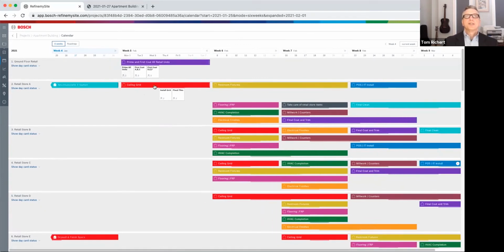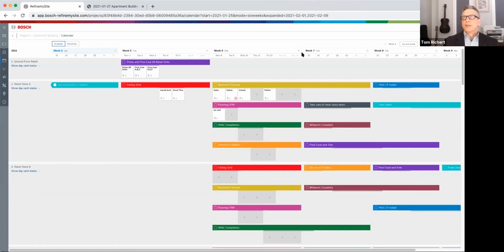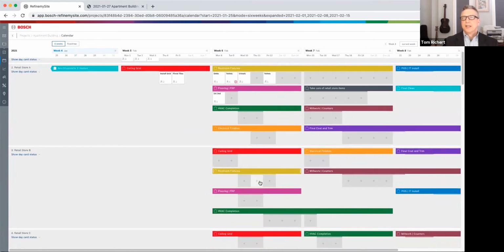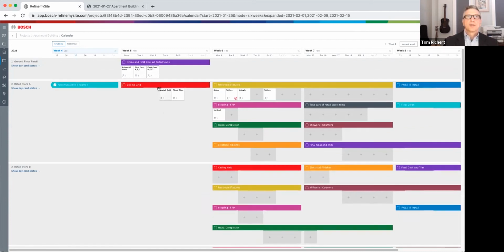For those 3 days, the foreman is able to be very clear and specific about what they expect to do in each of those days. What they're really doing is their weekly commitment plan, but being very specific as to what's happening every day. If I open up future weeks, I wouldn't necessarily coach teams to do their daily commitments that far in advance, because things can shift, and we need to be aware of that. But your commitments for next week,